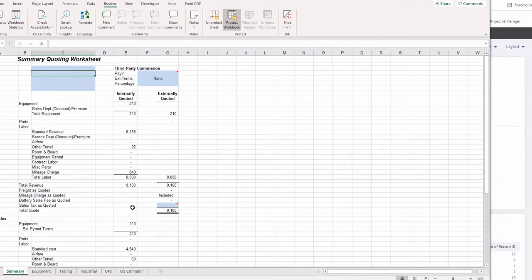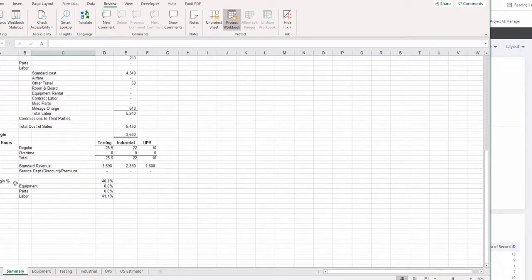It's just a summary of what's there, but it also gives you the gross margin percentage, which is 40.1% on this. The importance of that, and this is where there will be a stark difference between the different units: Test, you guys are used to making a lot of margin. Stationary is not. They have a large revenue, but the margin is different. So a 40% margin is actually really, really high for stationary. I would expect somewhere between 20 and 30% margin on any given job for a stationary quote. It just depends on what exactly we're doing.